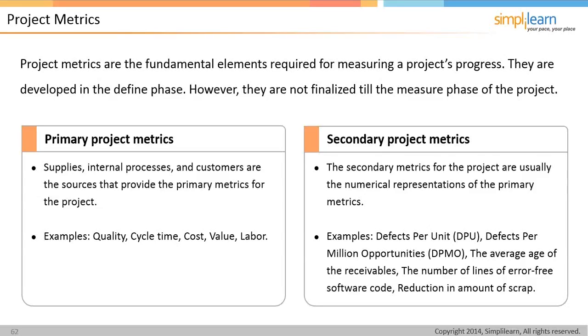If sales volume increases, of course, freight charges are likely to increase. Similarly, if sales go down, freight charges are likely to go down as well, independent of the process. Tying it to sales keeps it honest, keeps it consistent that way.